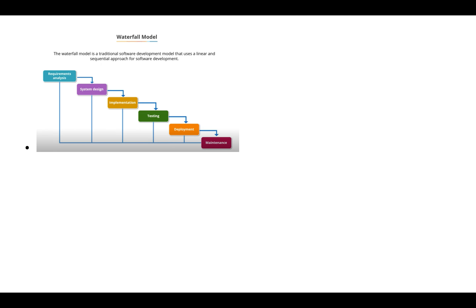Let's understand exactly what is the waterfall model and what were the shortcomings, so that we moved towards agile. The waterfall model is a traditional software development model that uses a linear and sequential approach. In software development we have different stages like requirement analysis, system design, implementation, testing, deployment, and maintenance. If we are following the waterfall model, we start from the first step — requirement gathering — spend some time on it, and once requirement analysis is complete for the entire project, we subsequently move to designing.